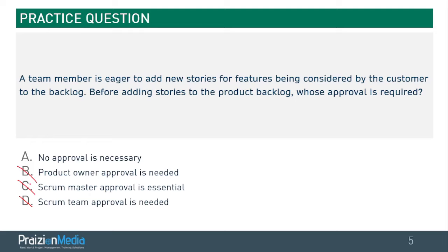Even if this was someone from outside of the team, adding to the backlog is not an issue. It's whether what is in the backlog will be done. Moreover, you got to remember this is a team member. Team members add to the backlog all the time. No approval is necessary. So the answer is A.